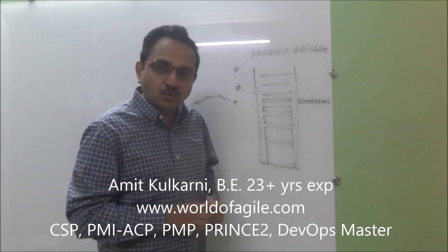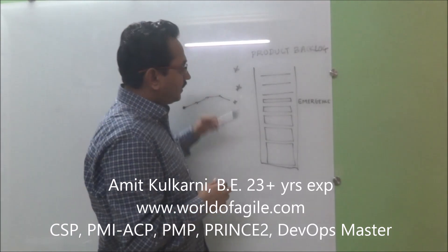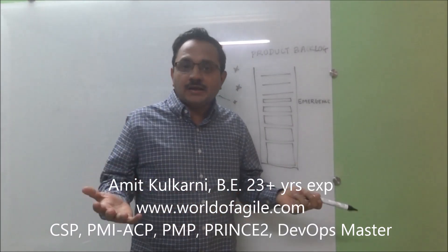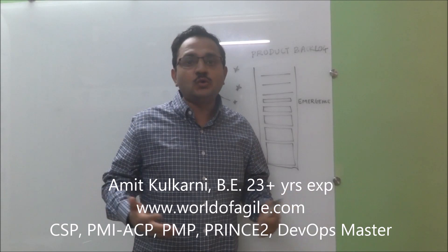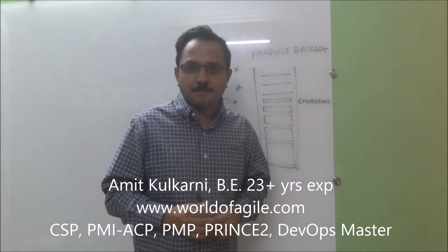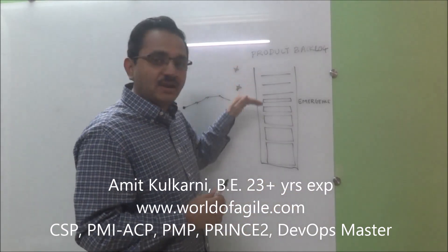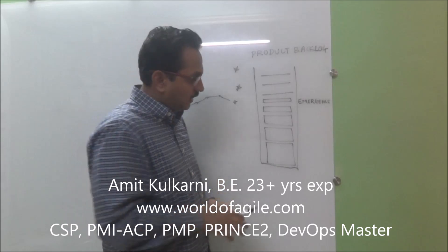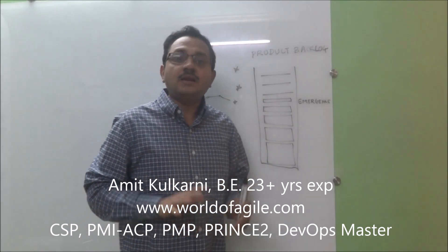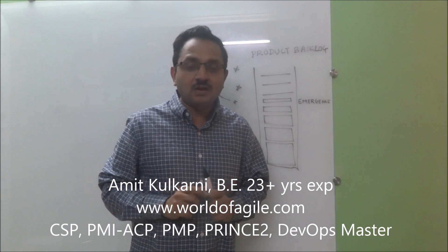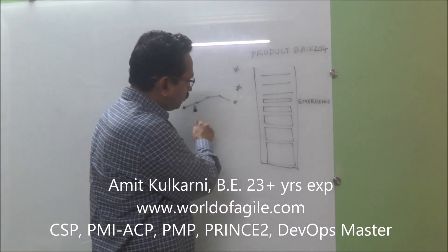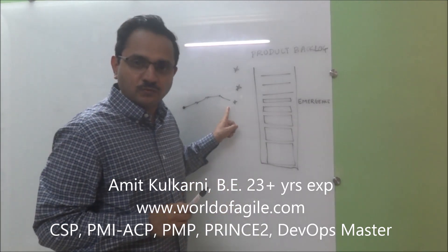What you essentially do is: the items at the top of the Product Backlog — those you are going to execute in the immediate upcoming sprint — are more clarified. But items at the bottom of the backlog are less clarified, meaning we give them an opportunity to change as our goal moves.